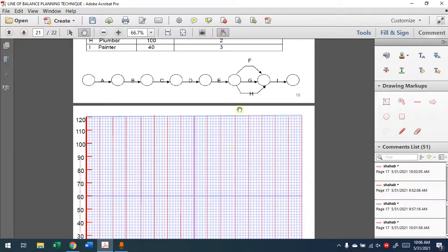Now, what else is important here? I depends on the three of them. The three of them should finish, then I will start. Whichever of the three finishes at the top, one of them will finish maybe later than the other. So you will take care of the three of them first, finish the drawing of the three, then you can draw I, because you don't know which one will finish at the end. Provide the buffer time between the three of them and this one here.